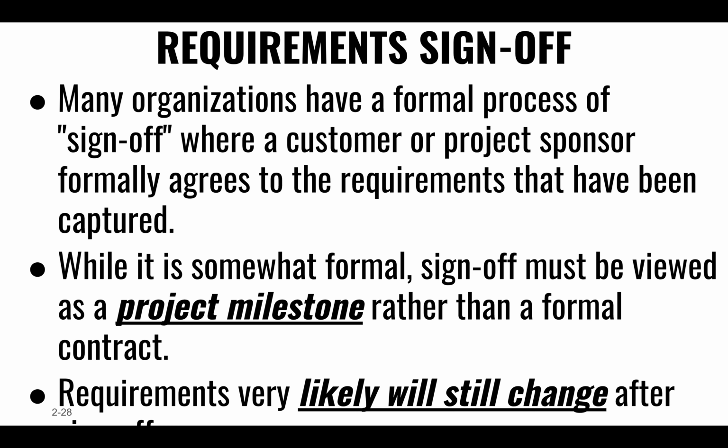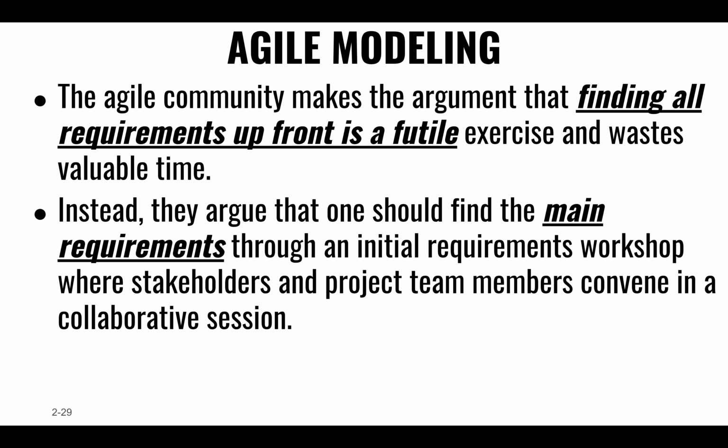Not as a form of contract saying, oh, careful, you can't break this contract, but more as a milestone, right? That we have achieved a level of confidence, that we feel confident that yeah, I think we could build this. I think we're ready to start going on this, right? And as a project milestone, we understand that some of this is going to change over time, but we feel confident that we can go further and start building this.